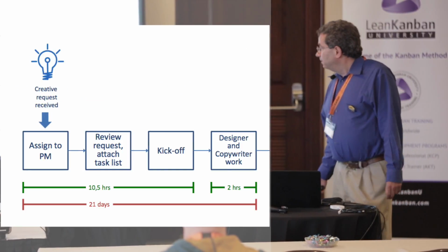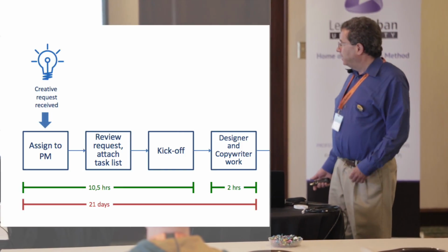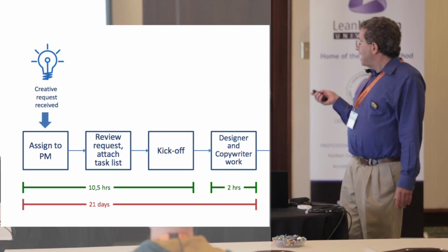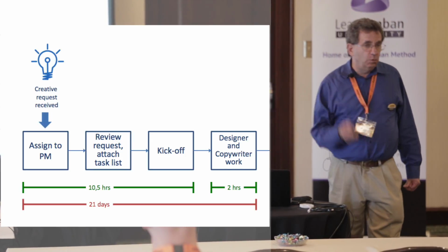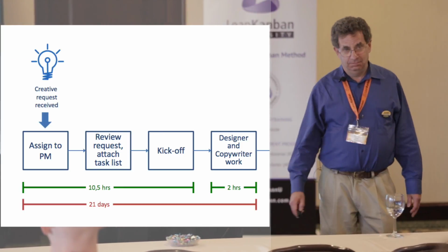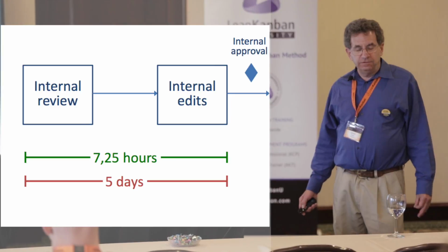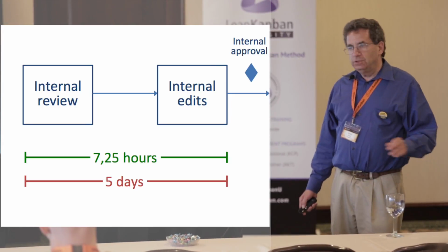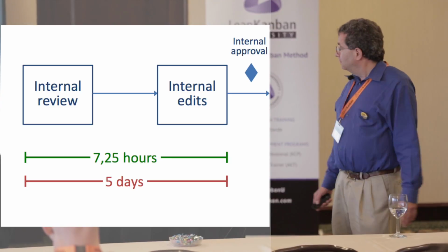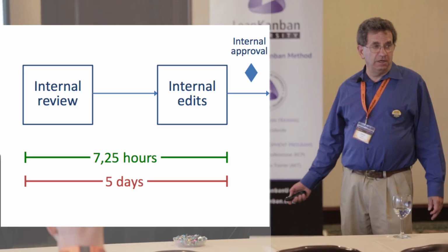So here's one example. Just to initiate a project, getting a project manager assigned, reviewing, kickoff, and then actually doing the 2 hours of creative work took 21 business days. The internal review, that was the art director had to review and approve the work before you could show it to the client. Okay? To get 8 hours worth of work done took a full business week.